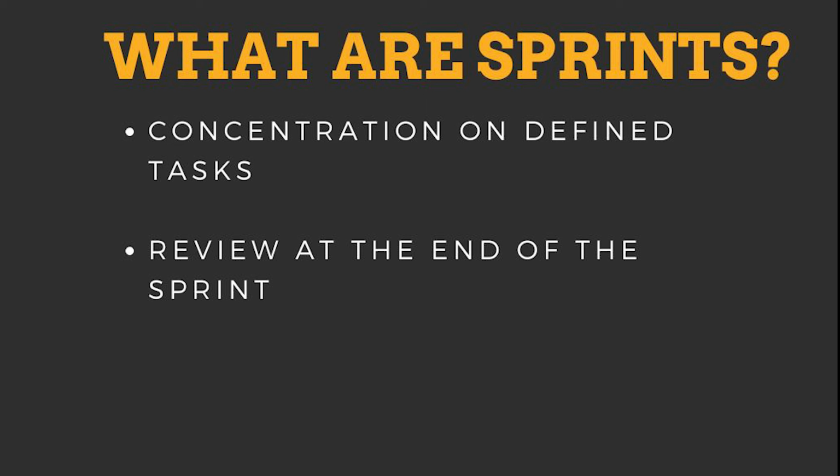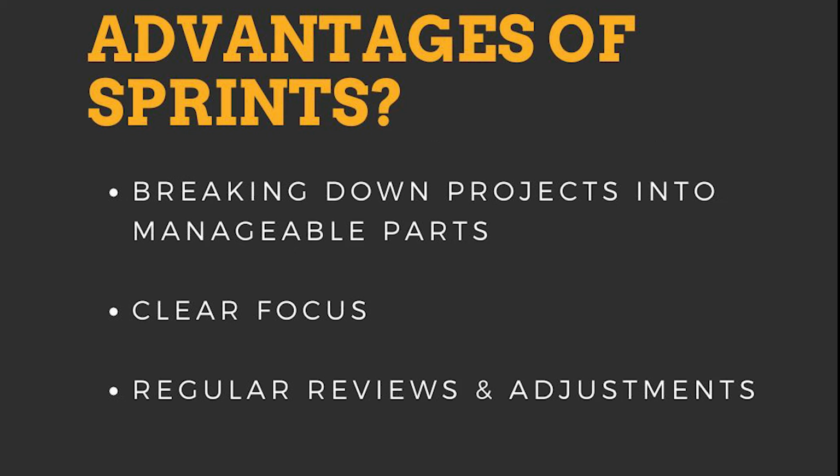At the end of each sprint, it is checked whether the goal has actually been achieved and which tasks are still open. Feedback is collected and the next steps are planned for the next sprint. As we can see, sprints offer several benefits, including the ability to break down complex projects into manageable pieces. And they offer a clear focus on short-term goals. And they also come with regular reviews and adjustments of goals and tasks, as well as the promotion of team collaboration.